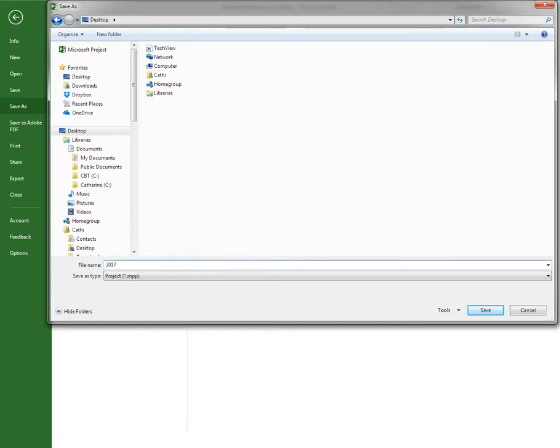This is for the year 2017, this is for the month of March, and this is for the client Bushy Park. So think about how you name your projects as well. We tend to, first of all, give them a year, so it sorts them by year. All my 2017s are together, my 2018s together. Then it sorts them by month, so all my March ones are together. Then it sorts it by client, alphabetically. So this has created a Microsoft Project Plan based on my template called Bushy Park March 2017, and I'm saving it to my desktop, so I'll go Save.